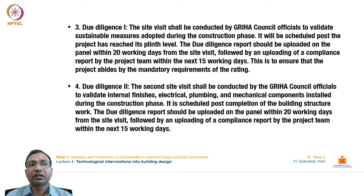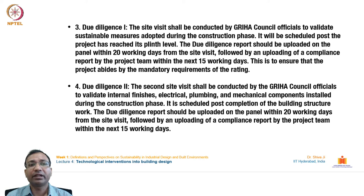Due Diligence 2 involves a second site visit by GRIHA council officials to validate internal finishes, electrical, plumbing, and mechanical components installed during construction. It is scheduled post completion of the building structure. The due diligence report must be uploaded within 20 working days from the site visit, followed by a compliance report within the next 15 working days.